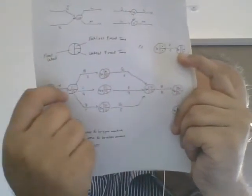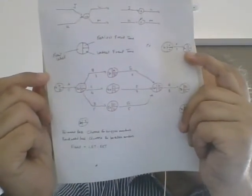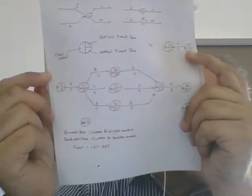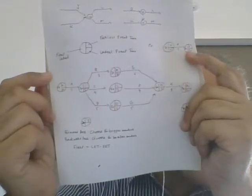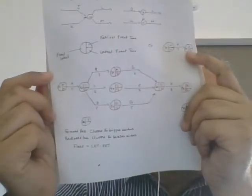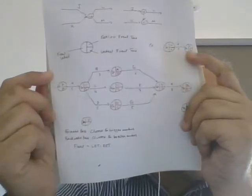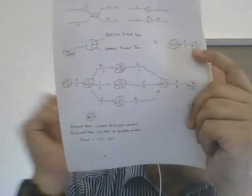So the central line through this diagram is 24 days in length and we call that the critical path activities, or we call this the critical path. So this is the most important part that we have to this particular project. And this is something that we have to ensure that the activities on this path do not get delayed by any amount of time. And the idea here is that the critical path has absolutely no float on it. So that implies that there's going to be no delays possible on this diagram.